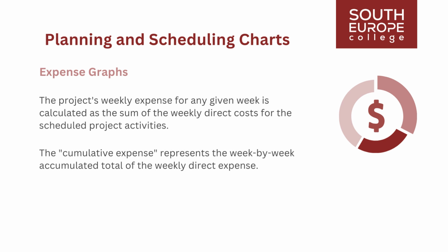Graphs of this nature are instrumental in project planning as they provide insights into when and where capital funds, labor, and other resources will be required. Furthermore, they prove beneficial for monitoring progress and comparing planned resource needs with actual resource expenditures.